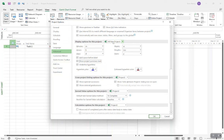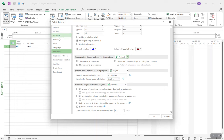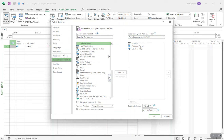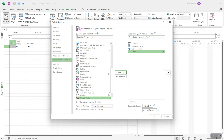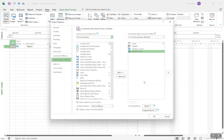Show the Project Summary Task — that's a great tip. Make sure it does that for all projects. You'll get a line zero for the project summary task. Some preferences apply to this project; others apply to all new projects — be mindful of that. I don't customize the ribbon, but I do customize the Quick Access Toolbar: I like to add Undo, Scroll to Task, and a few Project Online items like Cleanup Cache and Publish. Scroll to Task is my favorite.